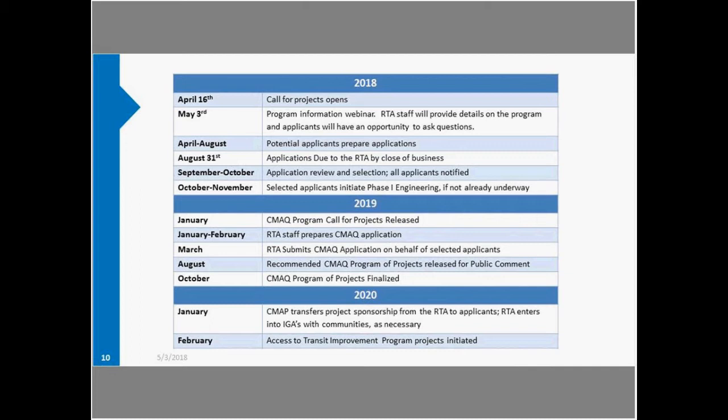The next steps after that, in January of 2020, CMAP will transfer the project sponsorship to the applicants, and the RTA will start working with those communities to set up intergovernmental agreements. And in February of 2020, we expect that you'll be able to begin work on the projects. So whether that's design engineering or going into the queue for construction.